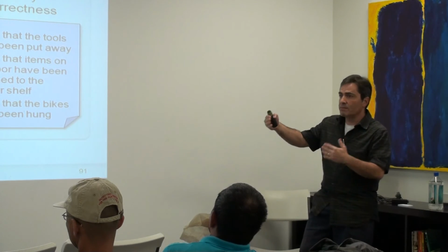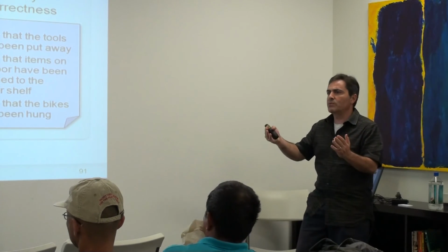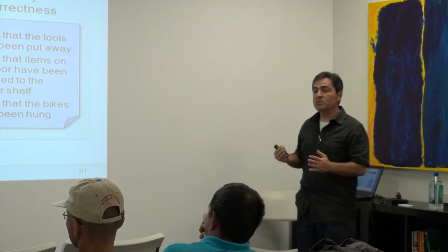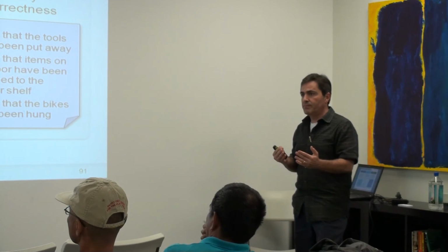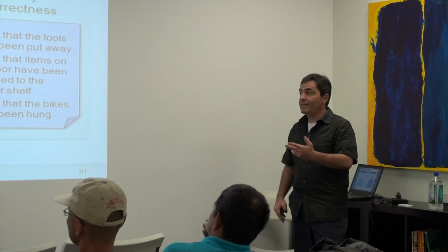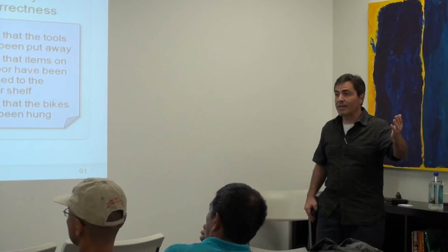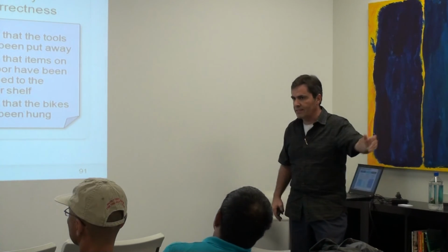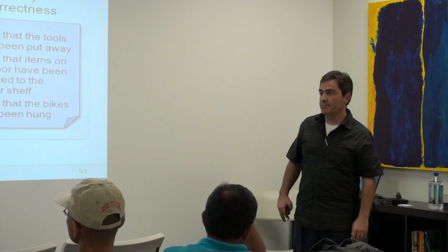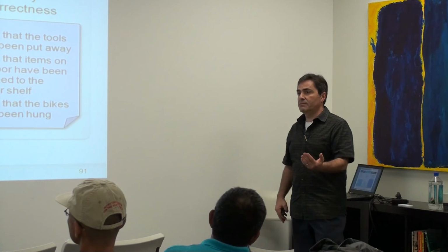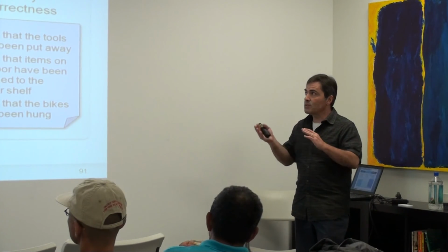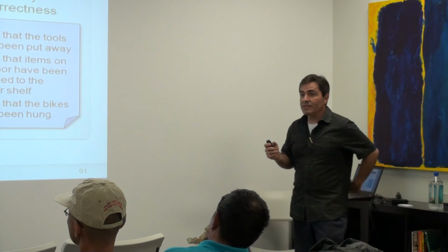So they might start out with, okay, let's talk about how we integrate with Salesforce.com. Well, okay, which modules? So the developer might ask, which modules do you want to integrate with? How do we handle these failure conditions? And the product owner may go away and say, okay, I'm going to do some research. I'm going to talk to some of our clients, to accounting, to legal, and figure that out. But they need a lot of input from development so they can do their job. And so that's why this conversation is critical.